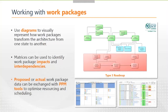We can use different views to understand different aspects of these work packages. For example, we can use matrices which help us understand not just the impacts of what work packages are affecting, but also where there are actual or implied interdependencies between work packages. For example, where multiple work packages are going to impact a single application, we might want to put a dependency between those work packages or actually bring them together as a single consolidated unit of work.